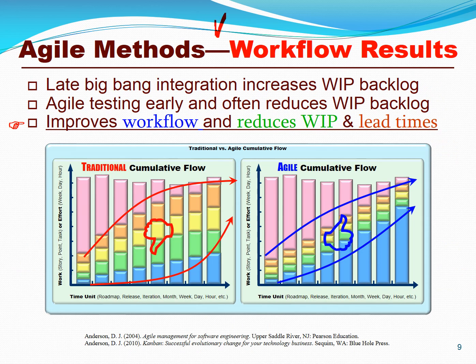So we can use cumulative workflow diagrams to measure agile performance. When you have overscope systems and you start too many requirements at one time, what happens is you bog productivity down, you create too many defects, and your lead and cycle times are extremely long. But again, when you implement projects in slices versus layers, this obviously not only increases your productivity and reduces cycle time and lead time and improves quality, but you ultimately get more satisfied teams and customers.